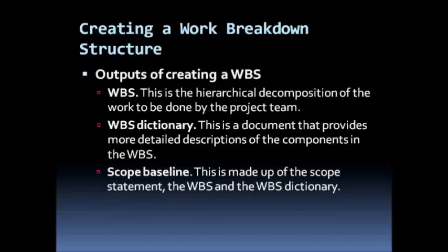And when we put together our scope statement, our WBS, and a WBS dictionary, we get what we call a scope baseline for our project, and this is the total scope of the project against which any scope decisions could be made.